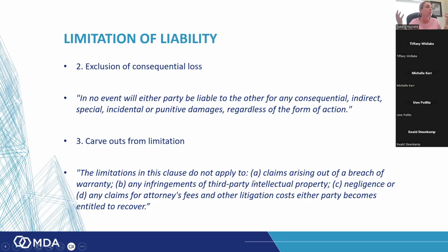You know, there are so many different ones, and this clause is messed with so much that all I can suggest and recommend is that if you see an indemnity and a limitation of liability clause that's been a bit messed with, just break it up and say, what exactly am I giving an indemnity for? What am I liable for under this contract? Can I get insurance for these additional risks? How much is that insurance going to be? You have to start asking these questions when you look at your liability umbrella under these contracts. Okay, so always try to limit liability.